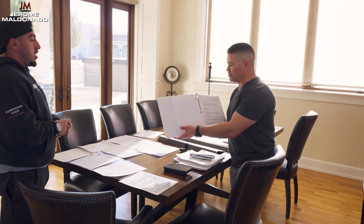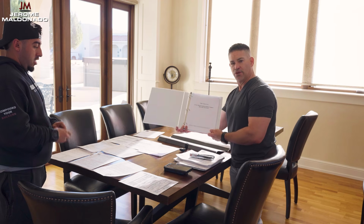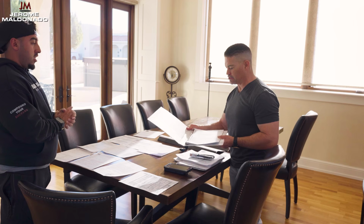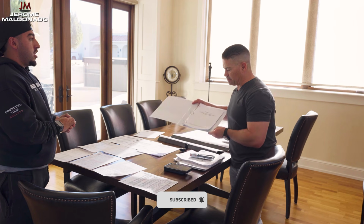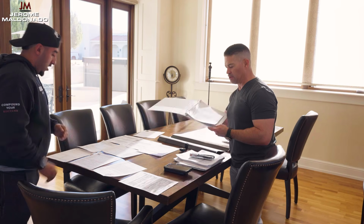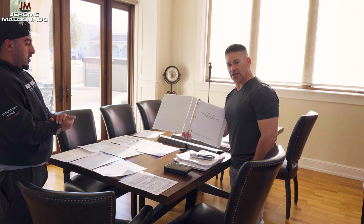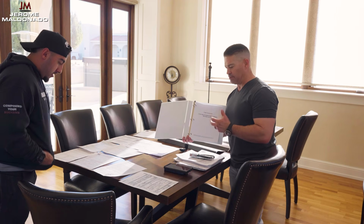Okay, so multiple reasons to be able to set this up. And we got it all packaged. The package is not fully complete yet, but it will be over the next couple days. We're about 90% there, waiting for employer identification numbers and a couple other SEC docs that should be approved by Monday. By the same time that we have this ready to go into the lender and for permits, all of this should be ready to go as well. And simultaneously, we'll apply both for the loan and for permits.